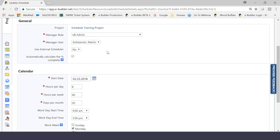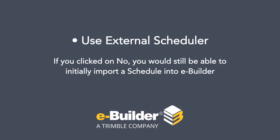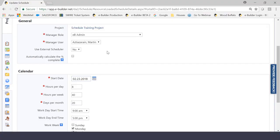Now, let me just clear one misconception. If you were to click no here and use external scheduler, you would still be able to initially import a schedule into eBuilder, which is one of three ways that you can get a schedule going. But then moving forward, you would update it using the module itself. So a lot of notes, a lot of thoughts around that one setting, but I just want to make sure all of you are aware of what it does.